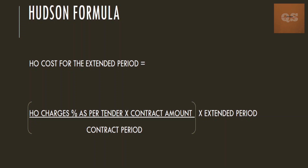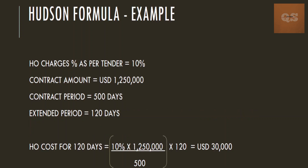Basically, the formula is: head office charges percentage (as per your tender document) multiplied by your contract amount, divided by the contract period, multiplied by the extended period. Let's see an example to understand this better.